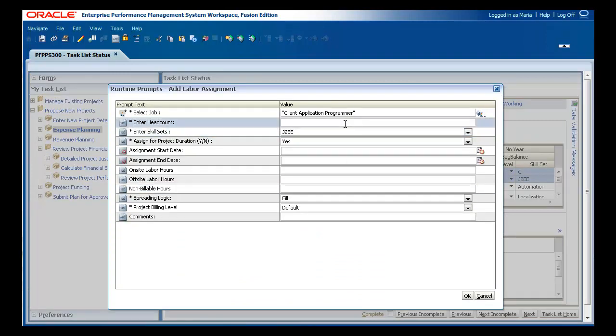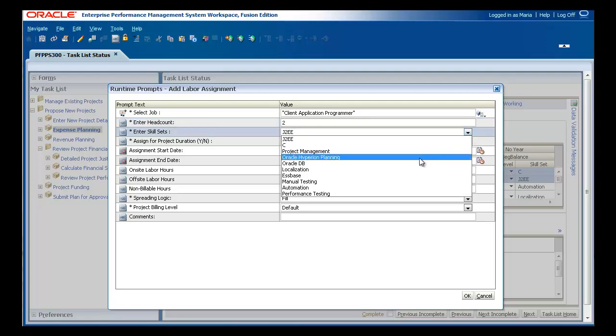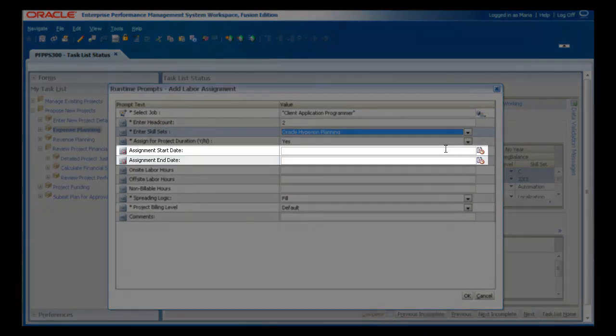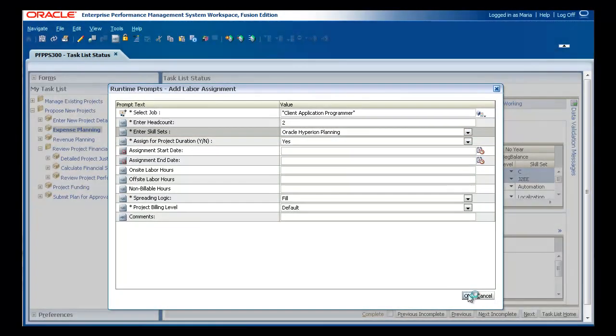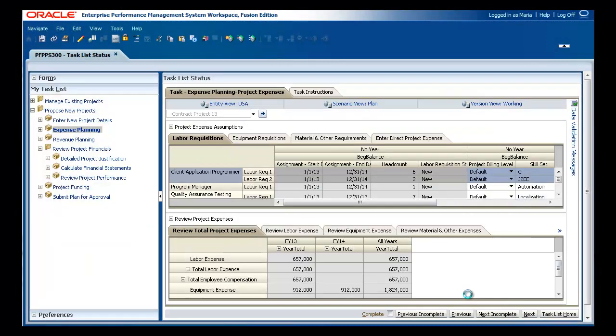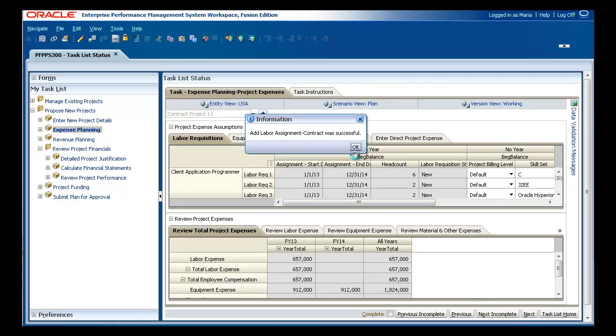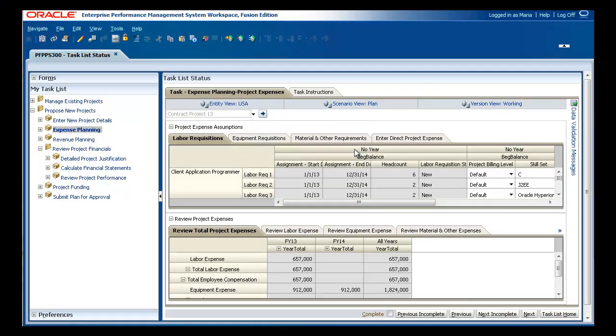If you do not need these resources for the entire project duration, you can specify start and end dates. If you do not specify allocation dates and methods, costs will be allocated according to the specified project start and end dates.